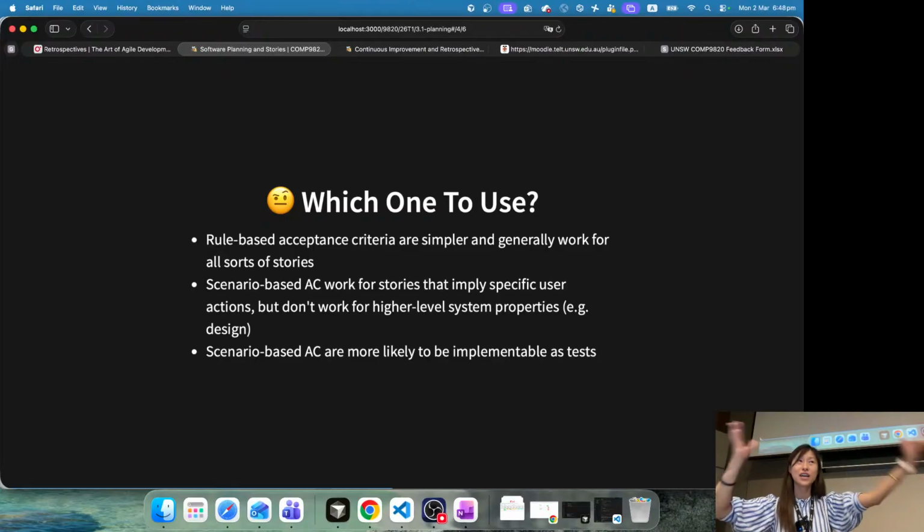So for example, for your first part, you can rewrite that into, as a student, I wanted to add different colors to my task so that I can know the prioritization of those tasks. So this is the structure. The structure will be very helpful for you to identify what are the values that you are providing and what are the actual features that the user can do and what are the types of the user. Right? Practicing following the structures of the user stories.